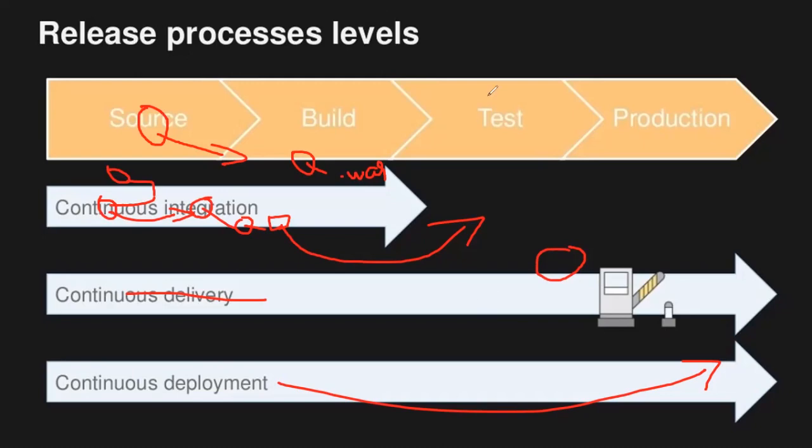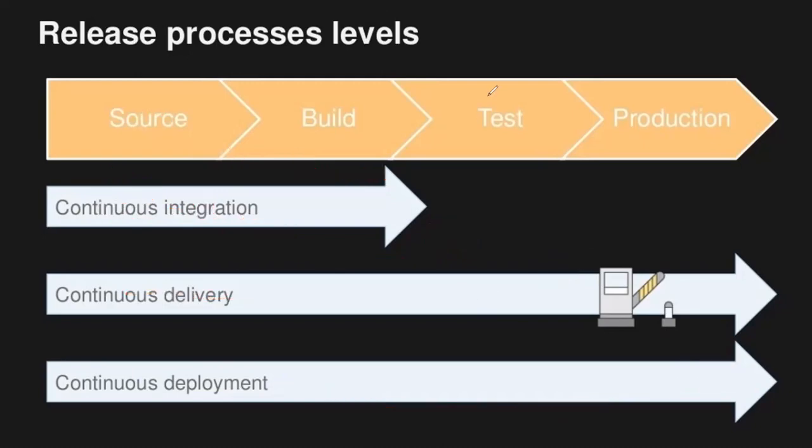Previously, we all remember, the deployment cycle is, I will get one version, right? Or my expectation, say after 3 months, this quarter we are going to release feature 1, feature 2, feature 3, right? So the whole quarter they will develop, hand over, and the next team will continue their task of testing, and hand over like this. So at the end of the quarter, they will announce one go live date and they deploy. But right now, we have started slowly going towards agile.